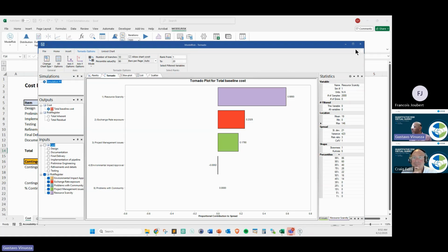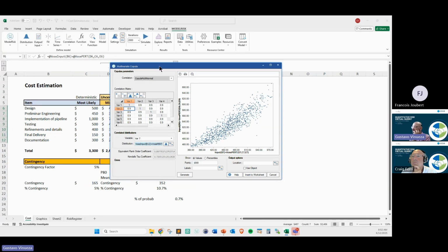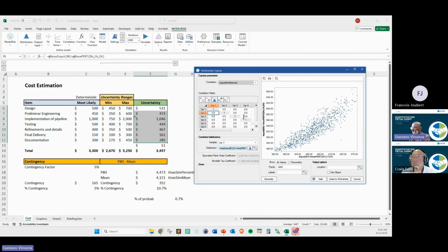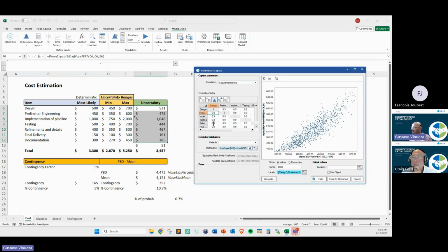You can add correlations, and with that I will finish, and I will go to the proper pause. For example, you can set up uncertainty here. I set up all the distributions like that, and what I can do is say here correlations multivariate, and this is going to generate automatically a correlation matrix with this 0.9 coefficient. Of course, you can change it. You can set up labels here like this. All right, like that. You see now you have the labels.